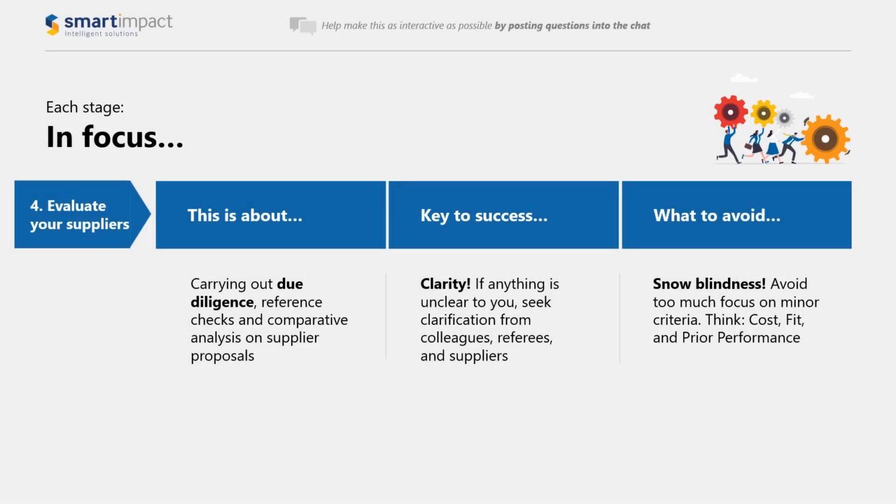So are they experts at delivering the type of solution that you're looking for, and do they have recent experience of doing that? And then the second is, to what extent can they cover the majority of your requirements with their solution? So this is probably something you need to evaluate to get an idea of the coverage of their solution with your requirements, but it's also about looking at what they've delivered for others and how closely those organizations match up with what you are doing. So track record in those two areas is really, really important.